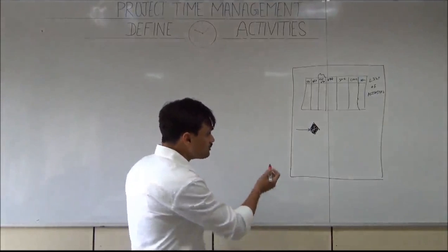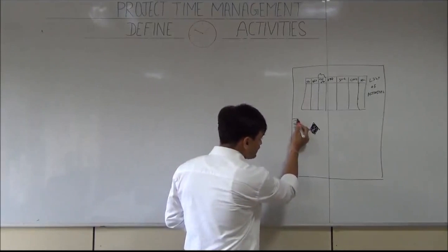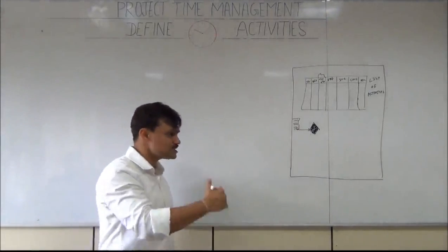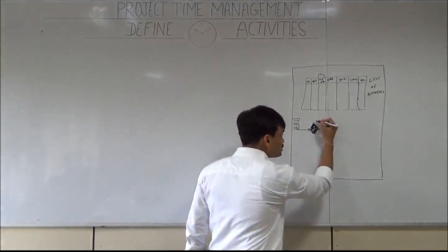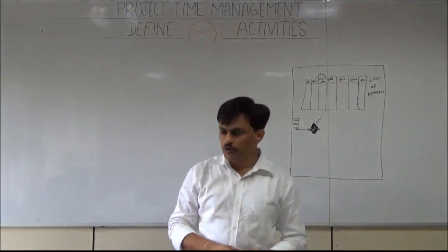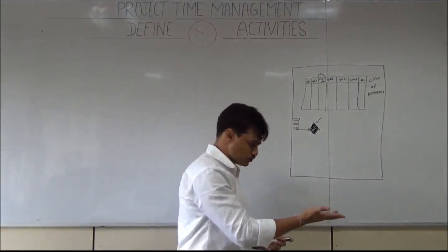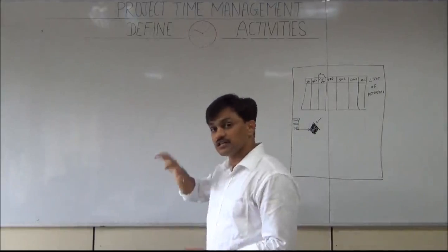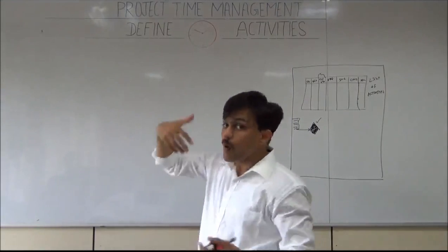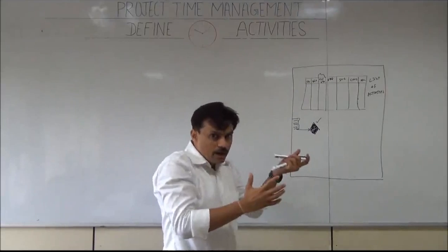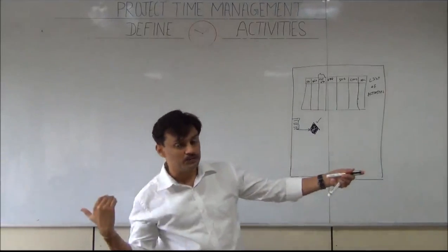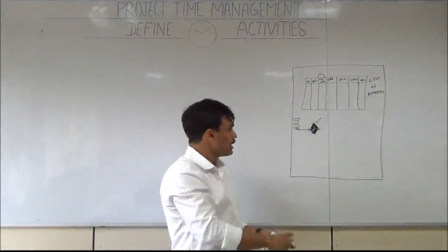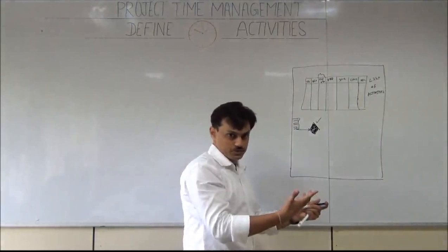Usually, in order to achieve the milestones, we need to finish n number of activities. So once those activities are completed and accepted by the respective stakeholders, we can say that this particular milestone has been achieved. Now milestones could be of two types. One is mandatory milestones. Mandatory milestones usually come out of the project charter or a contract, which is another source of the project charter. If our customer is expecting something to be done, and that may also get related with our payments or some constraints, those stages or those milestones are mandatory milestones.